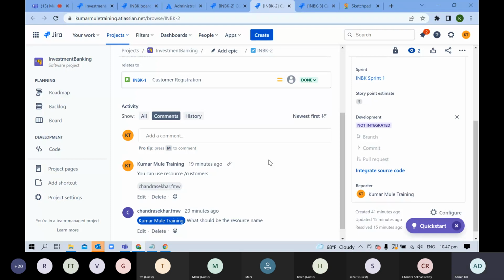If we see we have only 2-3 sprints left for this production go-live, and they are still pushing, but we don't have bandwidth and resources are going under stress, in that case I completely reject it. I say I can't do that, we will do it in the next sprint only. So there can be a dynamic answer. I don't think there is any fixed strategy on this.